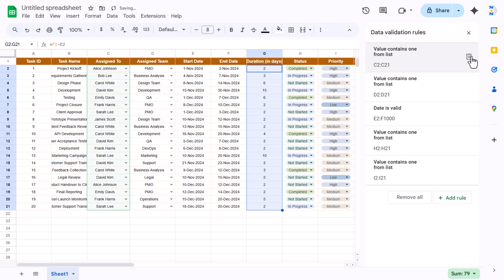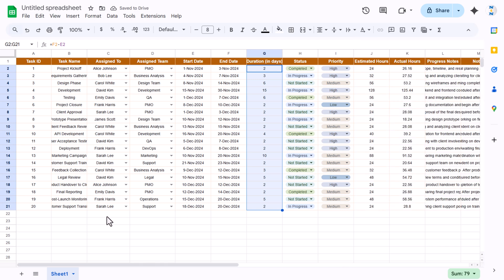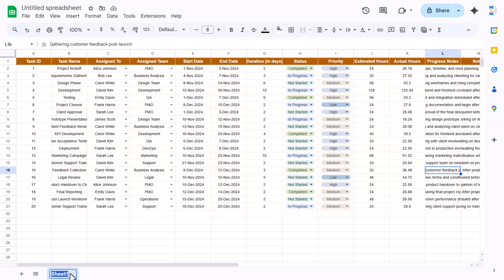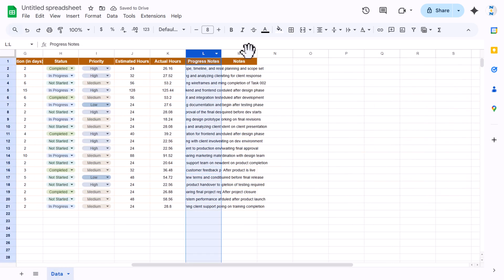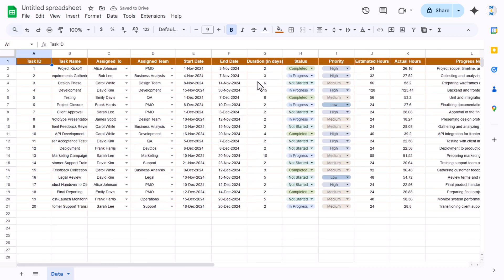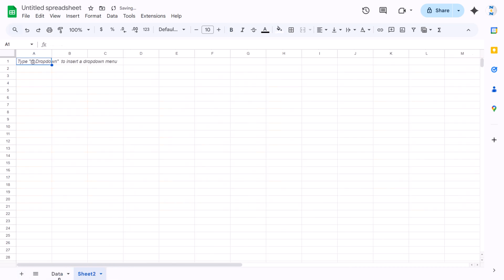The duration column uses the formula end date minus start date. The rest of the data you enter manually. Now we can increase the notes column width. This is our completed data sheet.